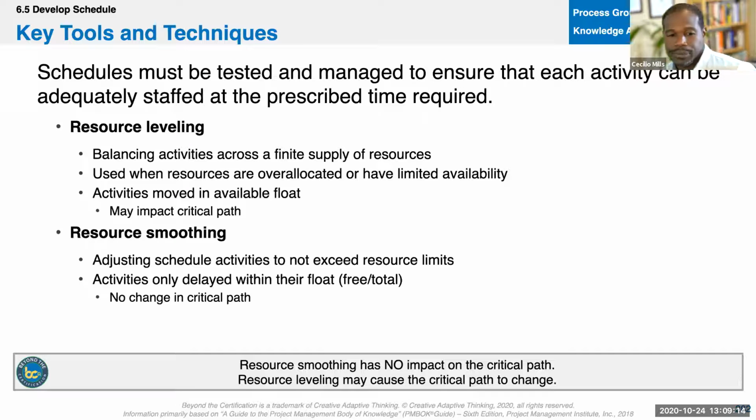All right. Okay. So that's leveling that I just showed you. Leveling and smoothing. These are resource optimization techniques, leveling and smoothing. Leveling will let the schedule slip, smoothing will not.